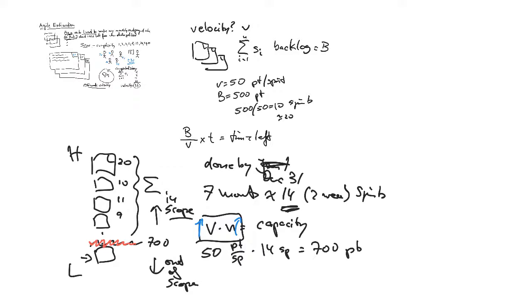Another reason why people often have a low velocity is because they get sidetracked. They're often on multiple projects. They have to context switch between projects. They have to go to extra work that is outside the project. They get distracted. Solution? Don't distract people. Dedicate people to a project. Co-locate them. That's a way of increasing velocity.